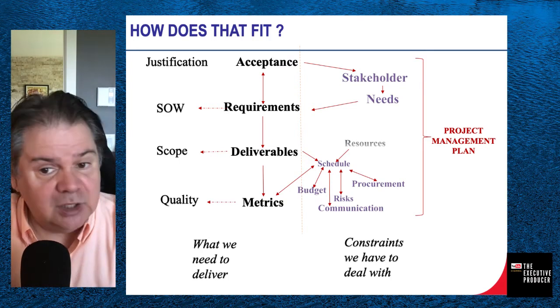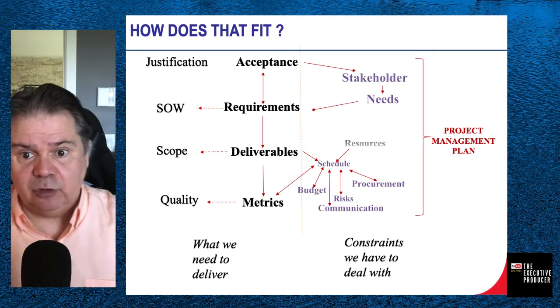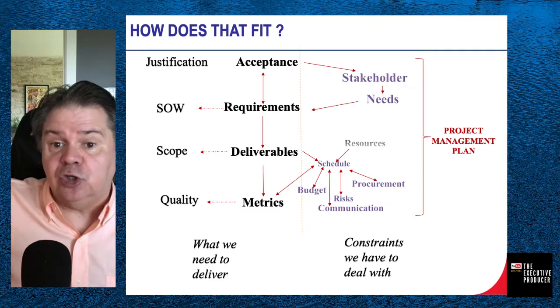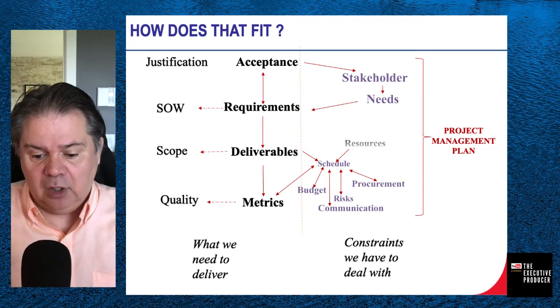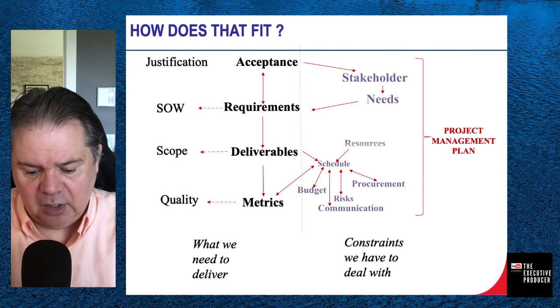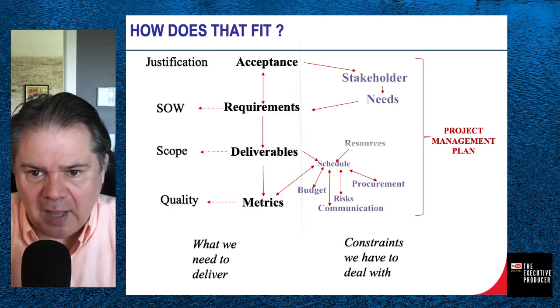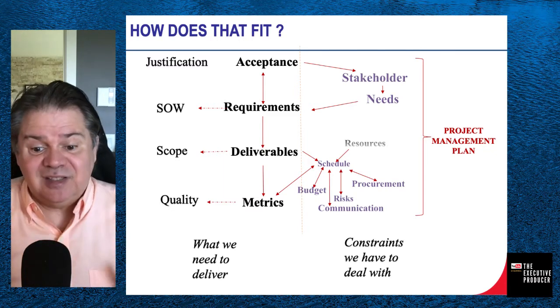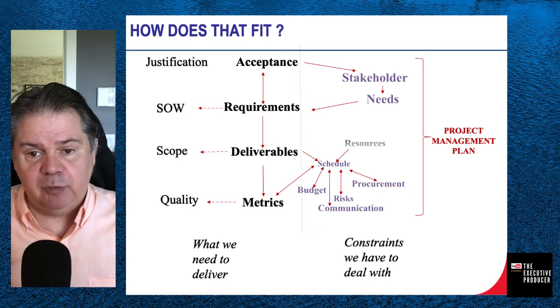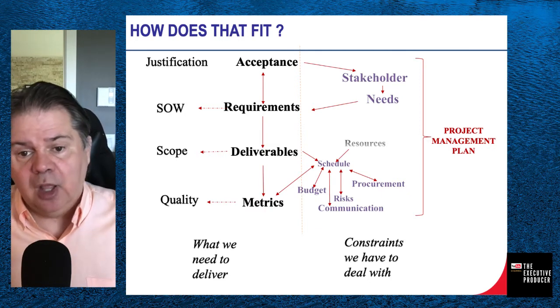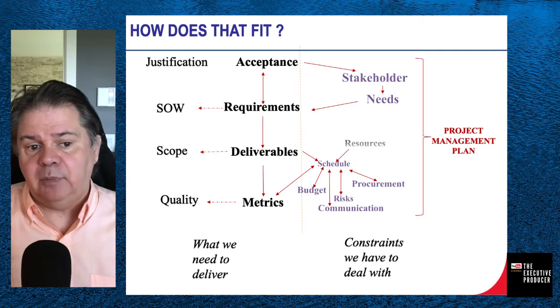Now we do the communication, same thing. Information retrieval, information distribution, retrieval, a lot of activities, distribution, a lot more activities. We have to generate the kind of content that they need to know. So all of this needs to go back in the schedule. The schedule is the center point, the heart that connects every piece. Every time we have a new activity, it goes in the schedule, allocate the resource, affect the budget.